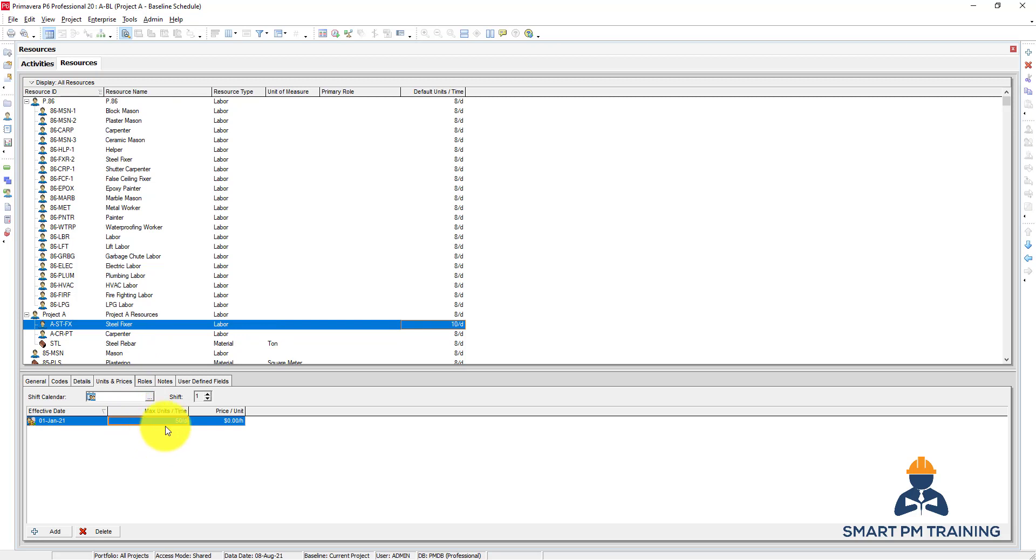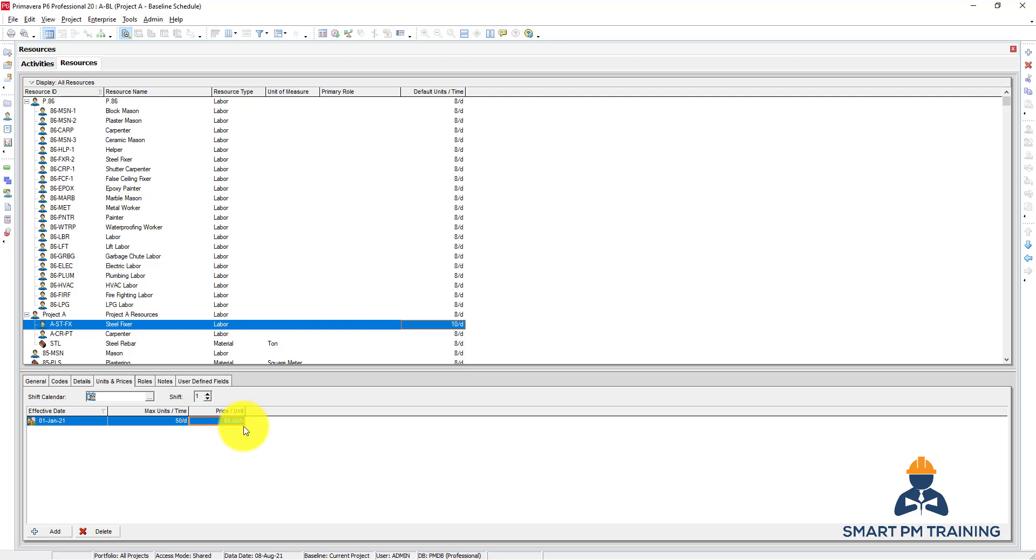The price per unit - so how much you're going to pay him per hour. So this is the hour rate. And I would keep it zero, because if you want to do cost management in Primavera, then you have to insert all the cost-related inputs including the hour price. But if you're managing contract, like the schedule you are submitting to the client, so of course you will not need to put this kind of information. You keep it zero and you create another resource called the cost to manage the cash flow of the contract, like the payments and the cash in, cash out for the contract.